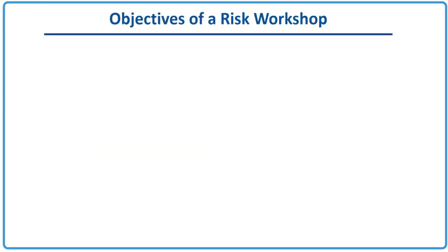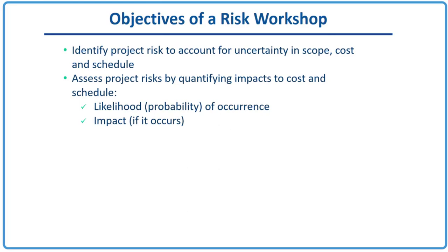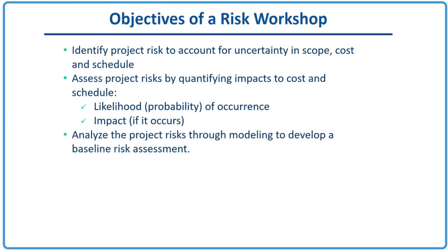Okay, objectives of a risk workshop. Identify project risks to account for uncertainty in scope, cost, and schedule. Assess the project risk by quantifying impacts to cost and schedule. That is, the likelihood that the risk will occur, and if it does occur, the impact it will have on either cost or schedule.